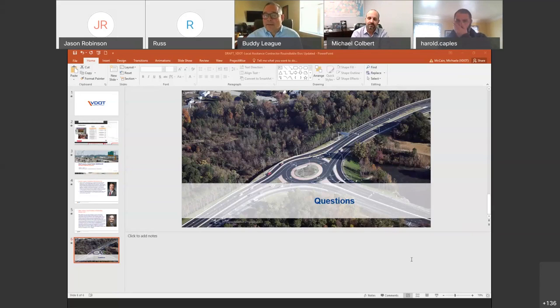I would say yes, it would provide some level of risk mitigation. We're assuming that when we take a set of drawings, those utility relocations have been taken into account when the drawings are done. I think the biggest issue with utility relocations is that sometimes they're just not where they say they are, or they're not on schedule. They're saying they're going to be out of the way and they're not yet.